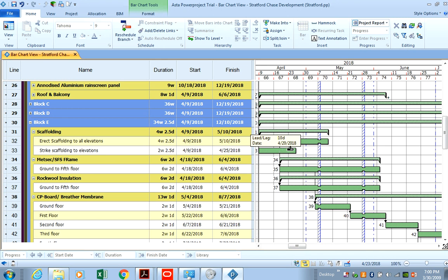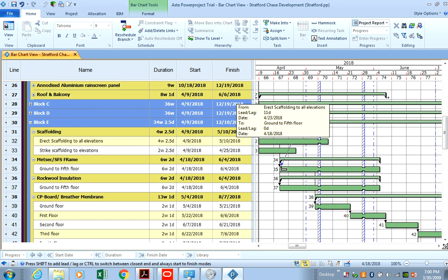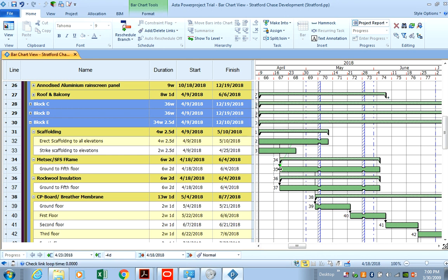If we start it at 2 weeks, 1 day, yeah, so this is from over here, you just know it's there to there is 2 weeks and a day. Alright, and you just literally pull it down and do that. Alright, and you delete the original link that was there because we copied it down. And then we've done that link.